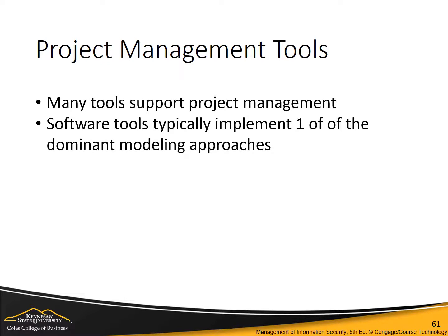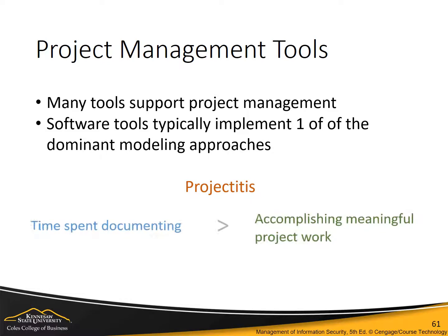However, project managers must take care not to get projectitis, which is what happens when the project manager spends more time documenting project tasks, collecting performance measurements, recording project task information, and updating project completion forecast than accomplishing meaningful project work.